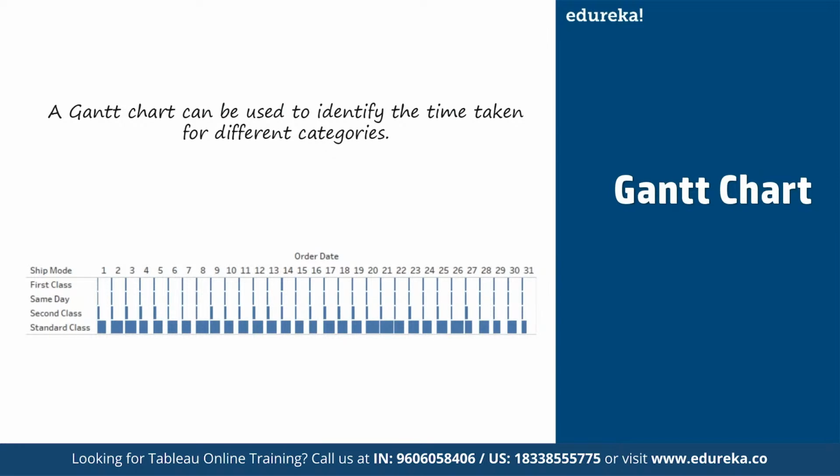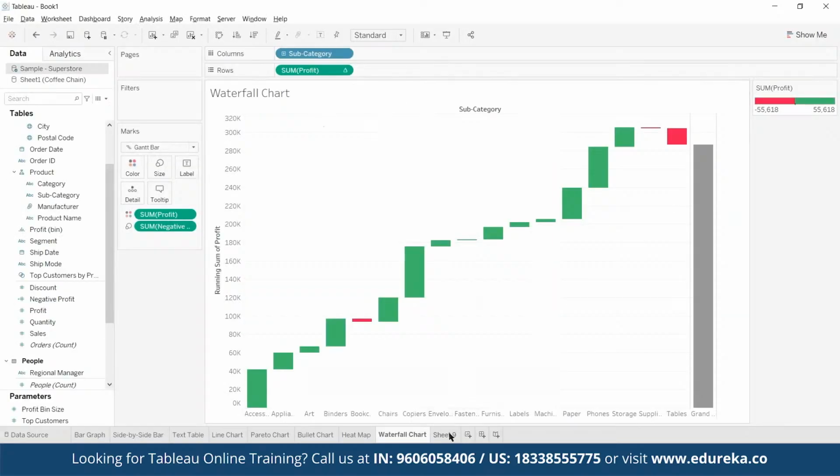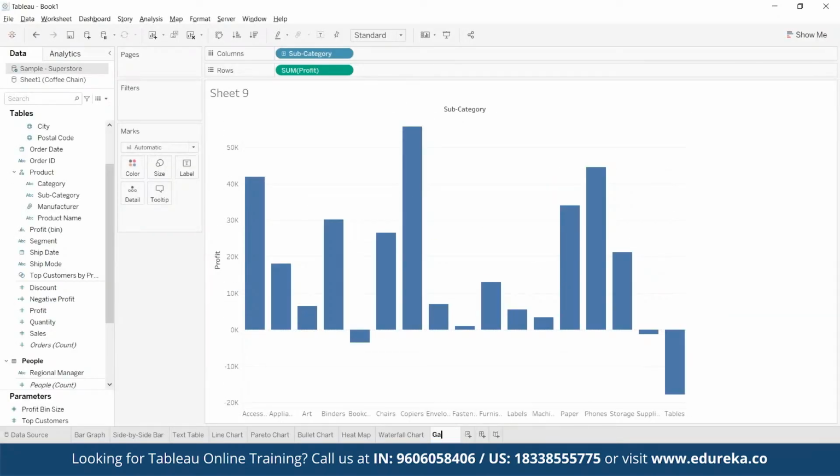Then the second activity. Let's say coming up the walls. Then the roof, fixing the doors and windows, electricity work, plumbing work, flooring work, painting work. So there is supposed to be a sequence in which we have to perform the tasks, do the activities in order to complete the work given to us, the final project. So that is what is indicated in a Gantt chart, list of activities against a timeline.